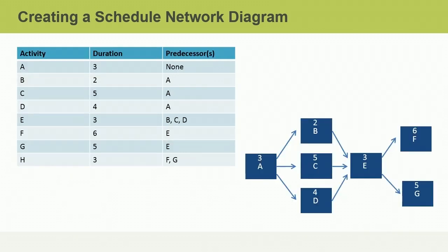Activities F and G are each preceded by E, but they have no dependencies upon one another. We have another point of divergence where the path splits.